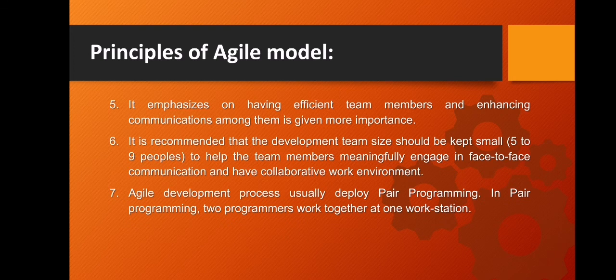Next principle is it is recommended that the development team size should be kept small, 5 to 9 people, to help the team members meaningfully engage in face-to-face communication and have a collaborative work environment.